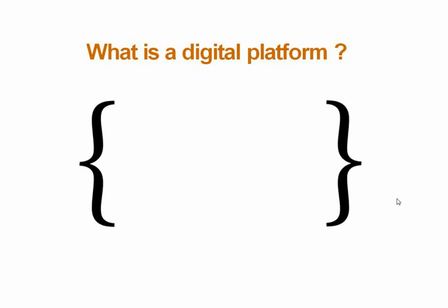And we see a few reasons why this occurs. One is we hear organizations say it's a question of what they don't know. There's a lot that's changing. There are new areas coming up, new types of products coming up, and it's hard to keep track. So when they collect requirements, they're not sure if the requirements are appropriate. Secondly, an initiative such as this is not limited to just IT. There are various parts of an organization that need to be engaged, including marketing, perhaps sales, and if they're not engaged, then the requirements are not properly articulated.